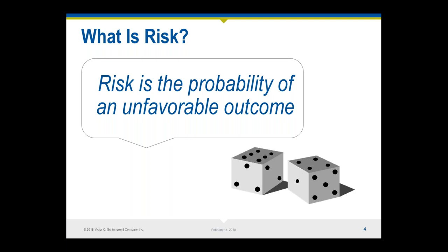The gap between expectation and outcome increases with the duration and complexity of the project, so it's a continuing effort. The second thing to think about when we talk about risk is that what's considered unfavorable to one stakeholder may be considered favorable to another. For example, lower fees paid to a design professional or reducing construction costs may equate to higher profit for your client, but it may also result in claims against the design team and contractors. That's why it's so important to have a reasonable integration of stakeholder objectives, starting with contracts that fairly allocate risk and reward.